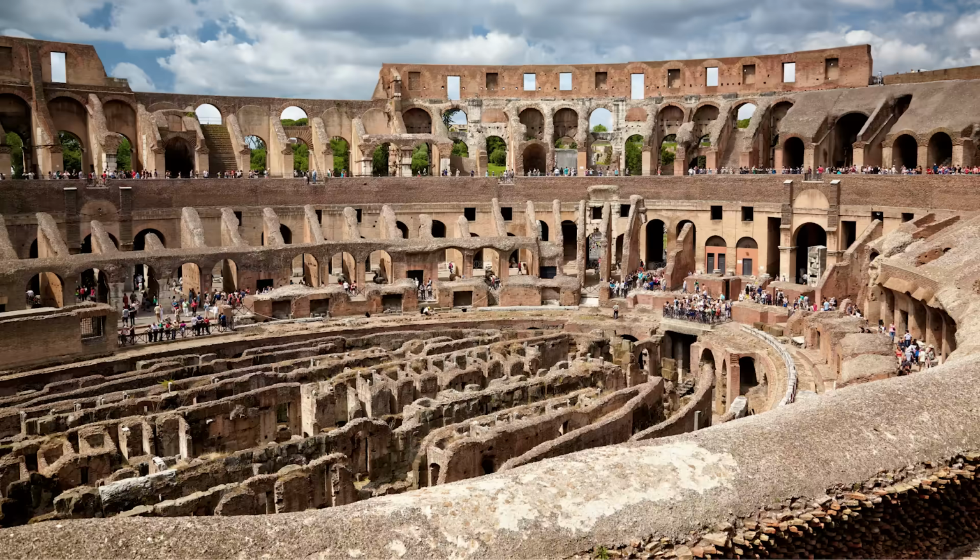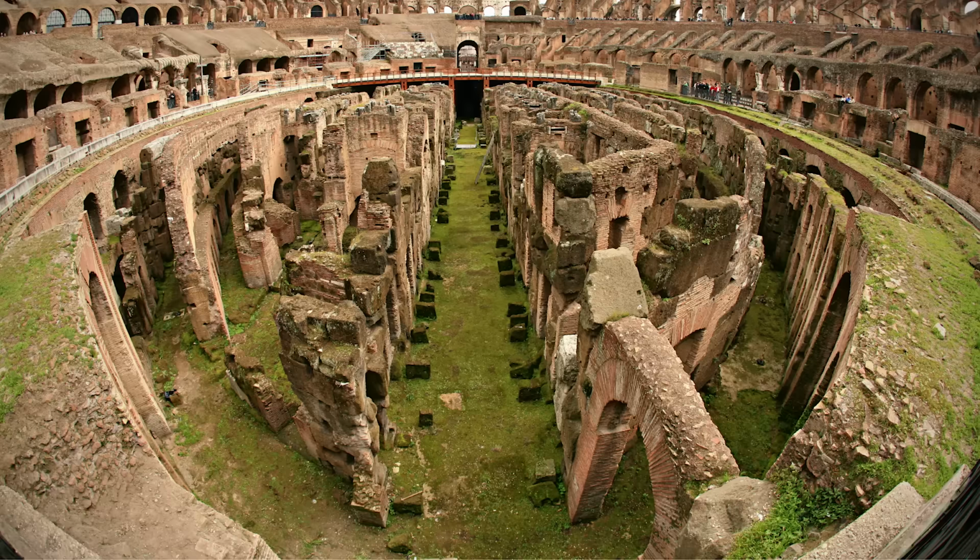If I did the math right, something like 70,000 man-days of labor would have been required to excavate and haul away 170,000 cubic meters of rocky soil. But this does not account for the fact that the workmen had to cut into bedrock on the north side of the foundation trench and had to contend with the high water table throughout. So let's say, conservatively, that 125,000 man-days of labor were required.